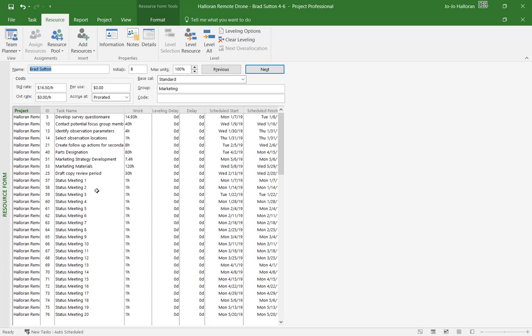And you can see here that on January 7th and January 14th, he's been assigned to the status meetings of 1 hour. So if I look up here, January 7th through Tuesday, January 8th, he's already working almost 15 hours on developing the survey questions. So we know we have a little bit of an over allocation there.